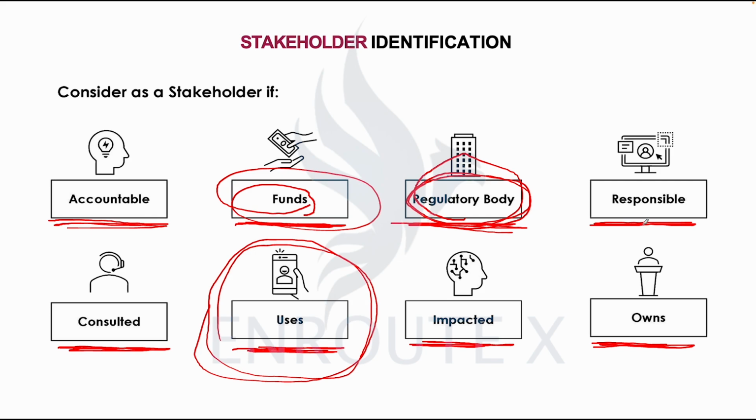So we can see a difference between the one responsible and the one accountable. The one responsible is undertaking that task. The one accountable oversees the one responsible. So in a Scrum team, the developers are responsible for their user stories, but the product owner is accountable for what they do.